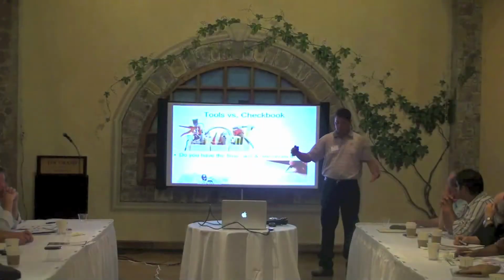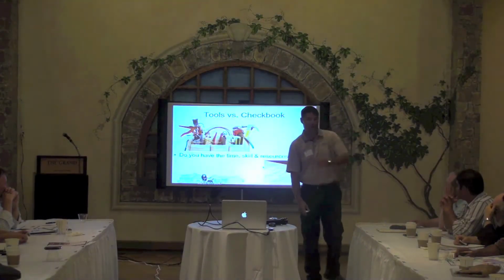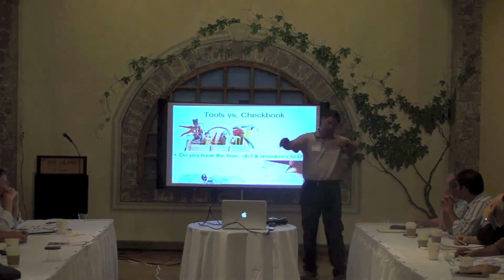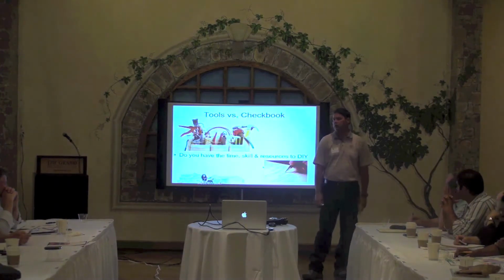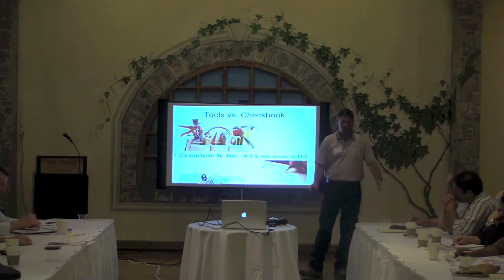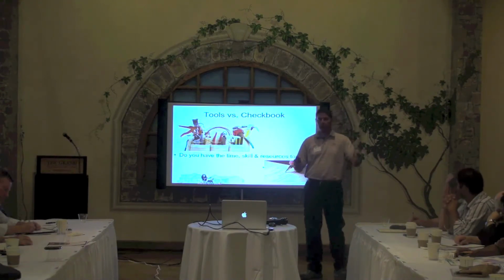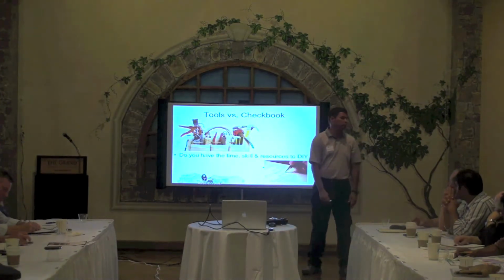So they forgot that. Here's this plan. It shows them digging back into the wall, into the dirt and the soil and everything, and hey, we're going to expand this and all this and that. Never put the retaining wall in. $235,000 to put a retaining wall in. 16-inch thick retaining wall, because it had to hold back that whole mountainside if it ever decided to move. You know, there's a contingency. I don't know how big a contingency you could have had.